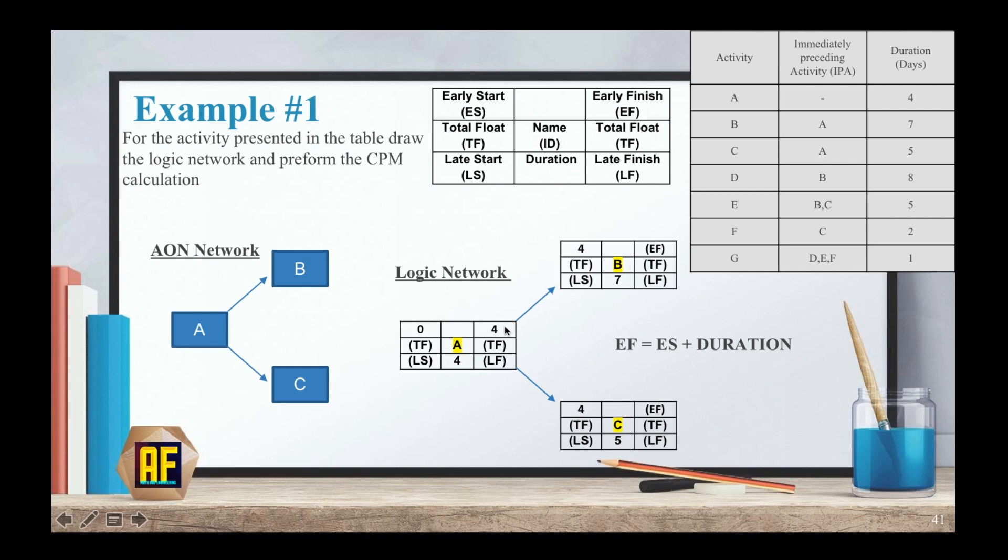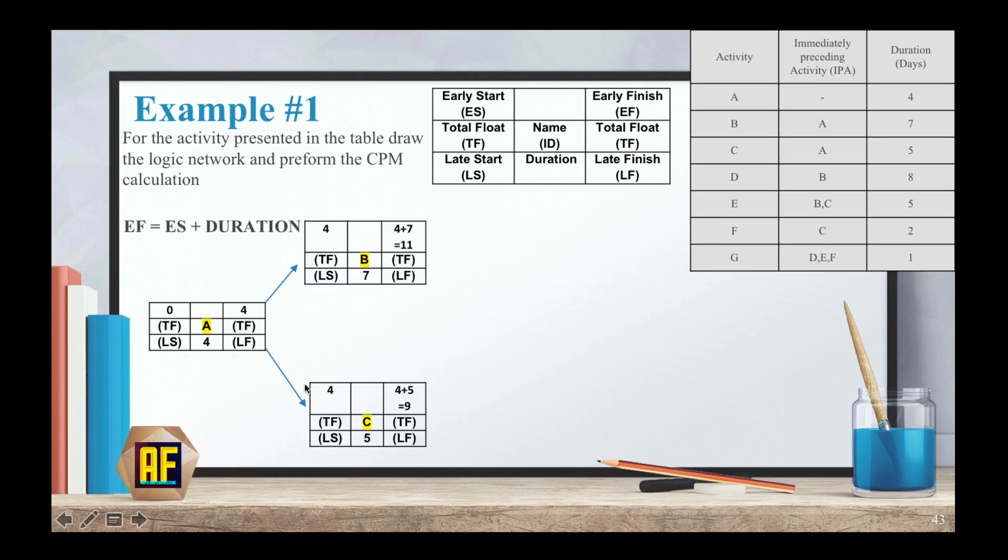Now we can connect this activity to B and C. And if our early finish is after four days, which means that activity B and C can only start, the early start can only be after four days as well. So for my ES, I'm going to write four here. And for my duration, I'm going to write seven and five. Now, what's my EF for B, four plus seven equals 11. And what's my EF for C, four plus five equals nine.